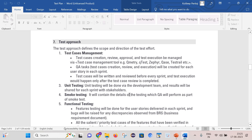The next section is the test approach, which defines the scope and direction of the test effort. First is test case management — test case creation, review, approval, and execution will be managed by a test management tool such as Qmetry, Qtest, Jafire, QAS, or TestRail. All test cases will be created, reviewed, and approved, then executed inside that test management tool. QA tasks like test case creation, review, and execution will be created for each user story in each sprint — meaning for each user story, we will write test cases, review them, and then execute them.